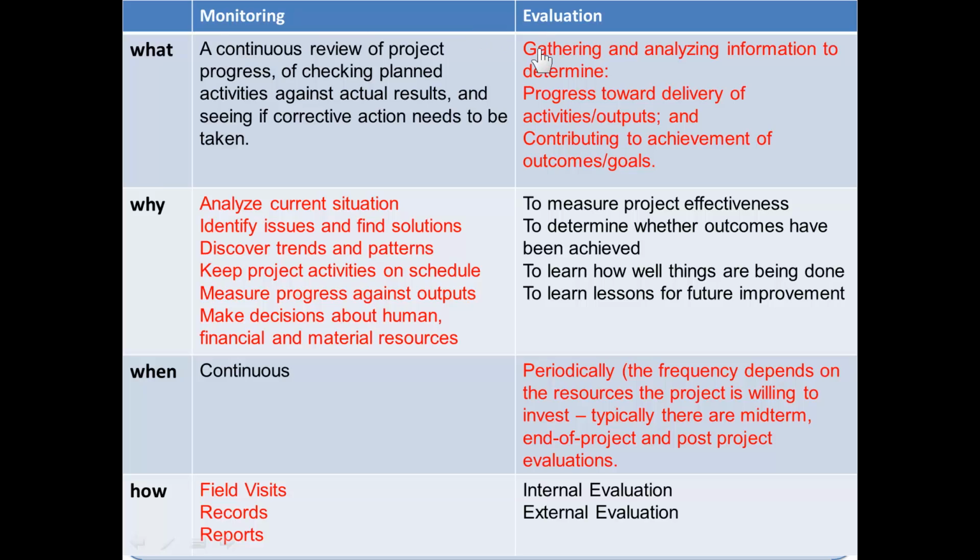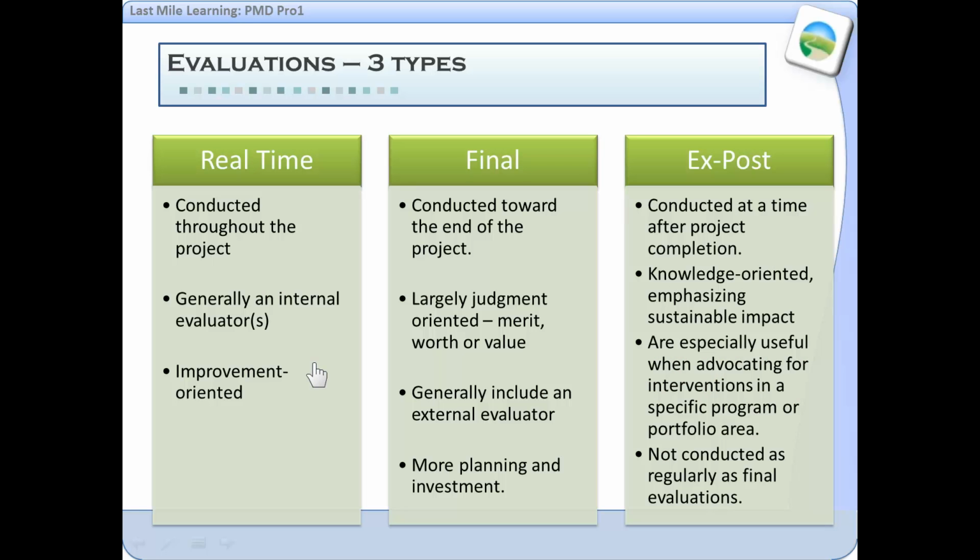I won't go over all of this in this video, but be sure in your reading that you know the differences between monitoring and evaluation, and there's a nice little table that shows the what, why, when, and how, and also the 3 types of evaluation that are mentioned in the PMD Pro Guide. The real-time evaluation, which is conducted throughout the project. Often the midterm evaluation is the most common, the final, and then the ex post. Ex post is conducted after the completion of the project as a way of learning and trying to inform decisions for the future.